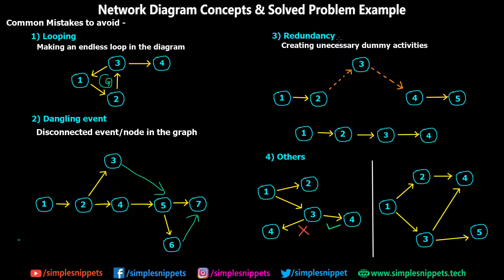The third error is Redundancy — using unnecessary dummy activities. For example, if we created an intermediate event 3 and two dummy activities unnecessarily in a diagram with nodes 1, 2, 3, 4, and 5, and we can avoid it, we should completely exclude it and simplify to just nodes 1, 2, 3, and 4.